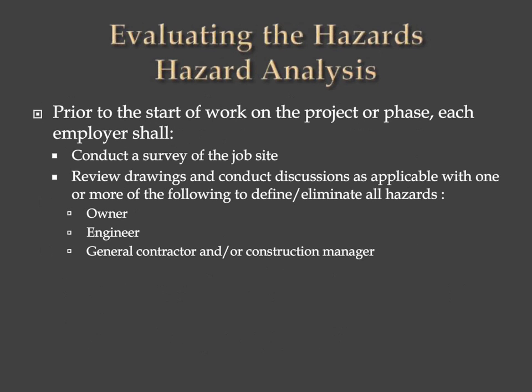Okay, evaluating the hazards. We talked about this in the big general picture. Let's talk about it in the small picture of what we're going to do here. Prior to the start of work on the project or the phase, each employer will conduct a survey of the job site. I'm talking about his job site. If he's going to put a new roof on, he needs to go inspect the roof that's there.